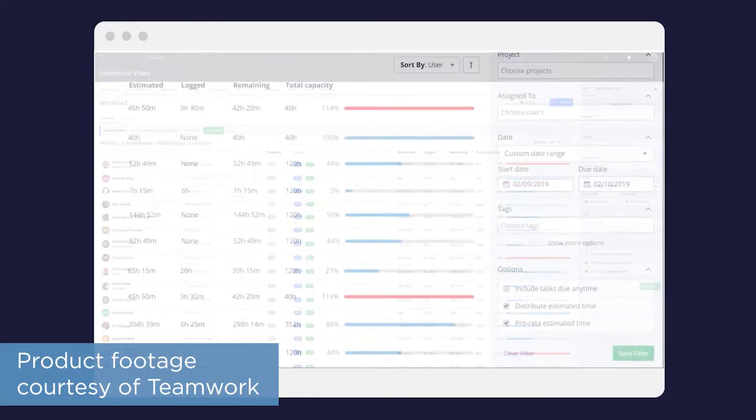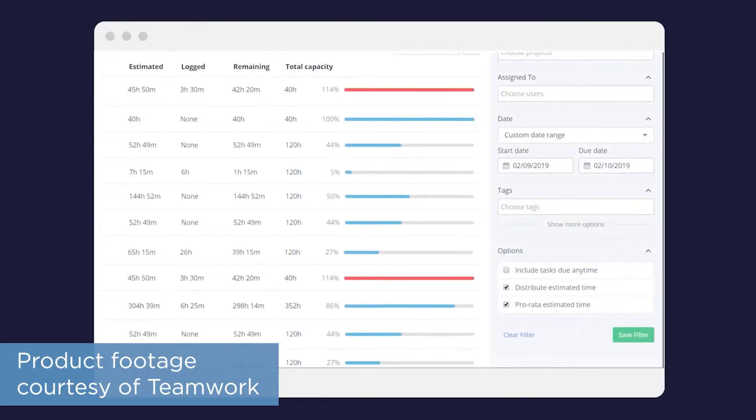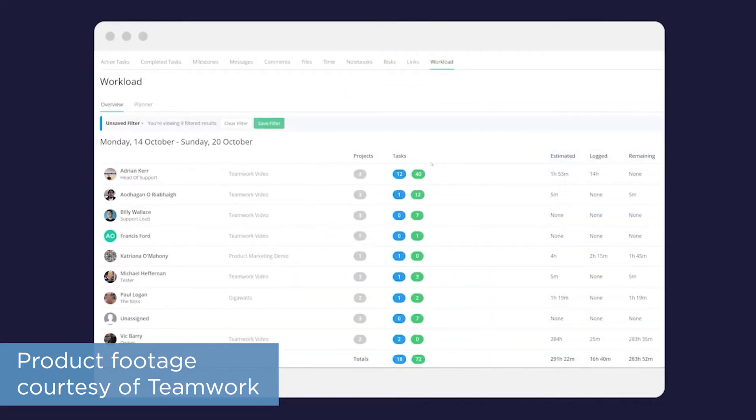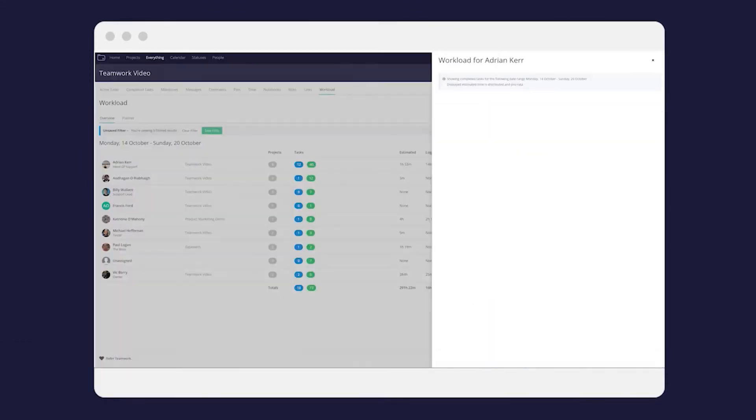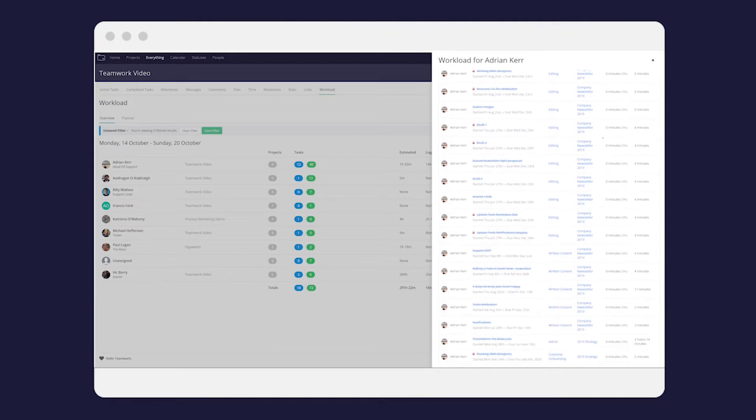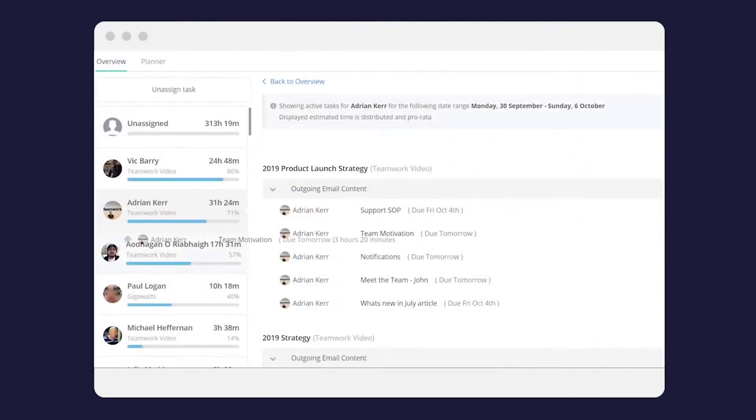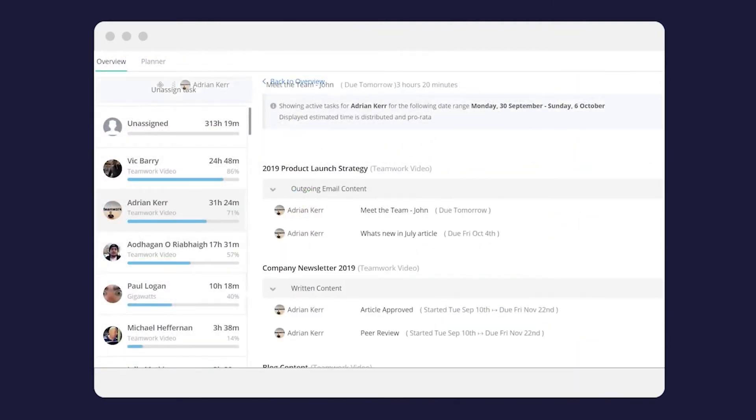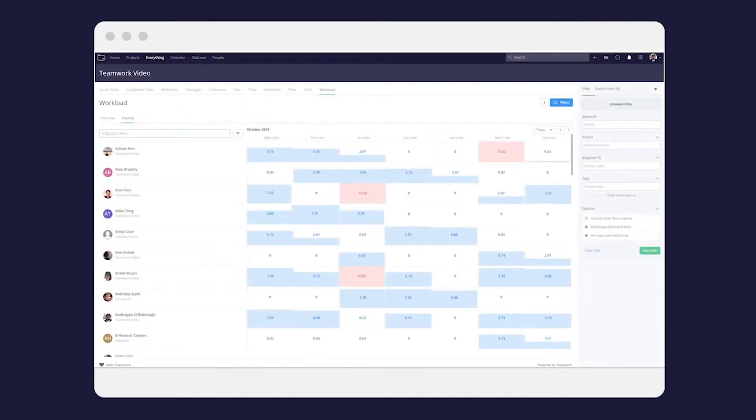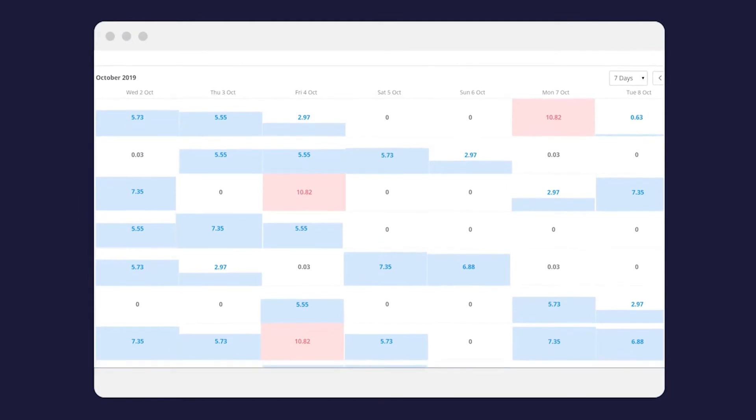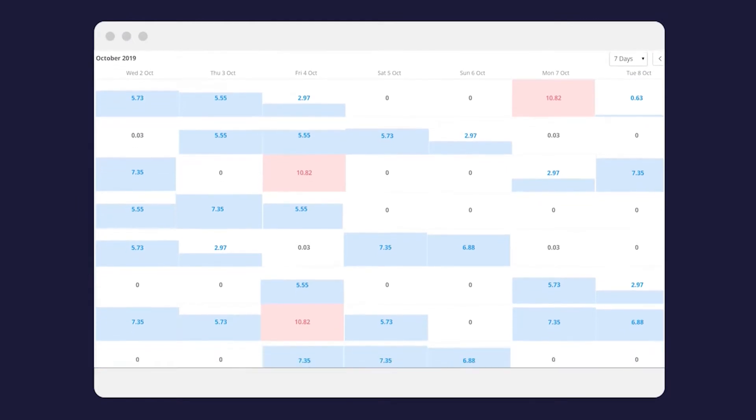For premium and enterprise customers, Teamwork lets you set estimates for how long it'll take to complete different tasks. This lets Teamwork calculate workload capacity levels for each team member, giving you insight into how much they have on their plate and how much room they have to complete additional tasks.